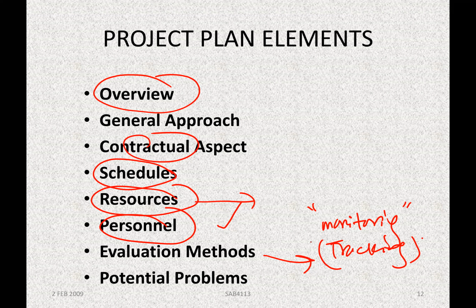If, for instance, it deviates, or we call it variance, if the variance is too much, the variance could be negative. Negative is normally associated with bad things. Let's say negative variance. It means our project is running late or over budget as opposed to what is supposed to be spent, and then we need to do something. Okay. And we expect potential problems. That's what planning is all about.